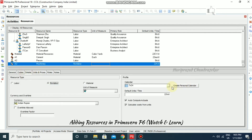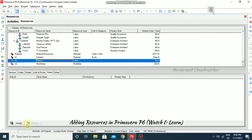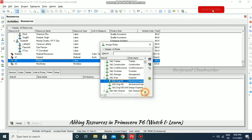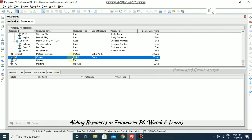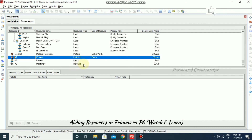The calendar can also be changed here if you want. For Roles, if you have any, you can assign them — normally roles are assigned to labor. For example, a labor resource could be an electrical engineer, mechanical engineer, or some other role. Like this we can add material resources, labor resources, and non-labor resources in Primavera P6. Based on these we can assign resources to project activities and finally get the total cost of the project, which includes material cost, labor cost, non-labor cost, and additional expenses.